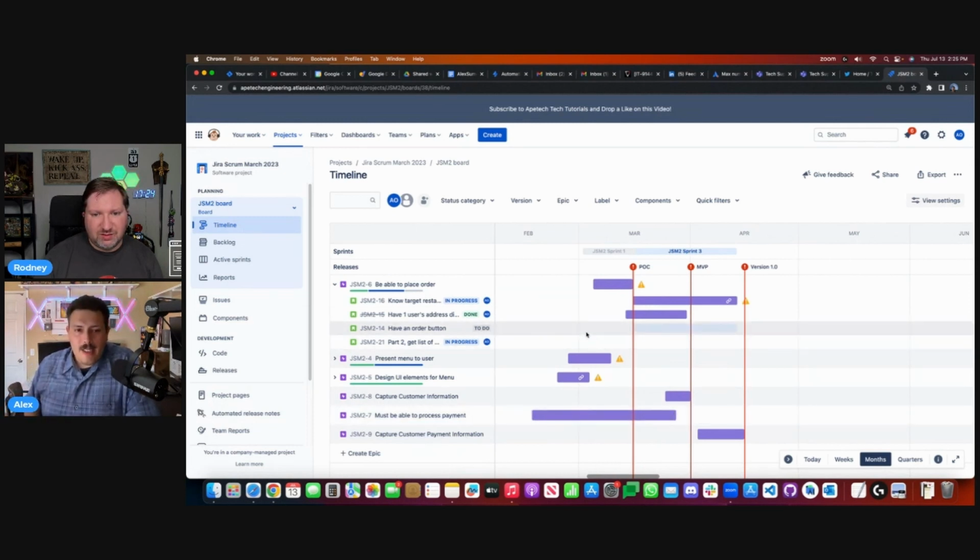And the reason is because stories should be reflected based on the sprint that they're in. Their start date is the beginning of the sprint, and their due date is the end of the sprint. And if your team wants to procrastinate and wait till the last day to do all their work, then that's doable. That's the laws of engagement of being an agile team. And so Jira does that out of the box, so that's why you're seeing this behavior. But it seems counterintuitive for people that are more traditionally waterfall, because they're doing that cardinal sin.